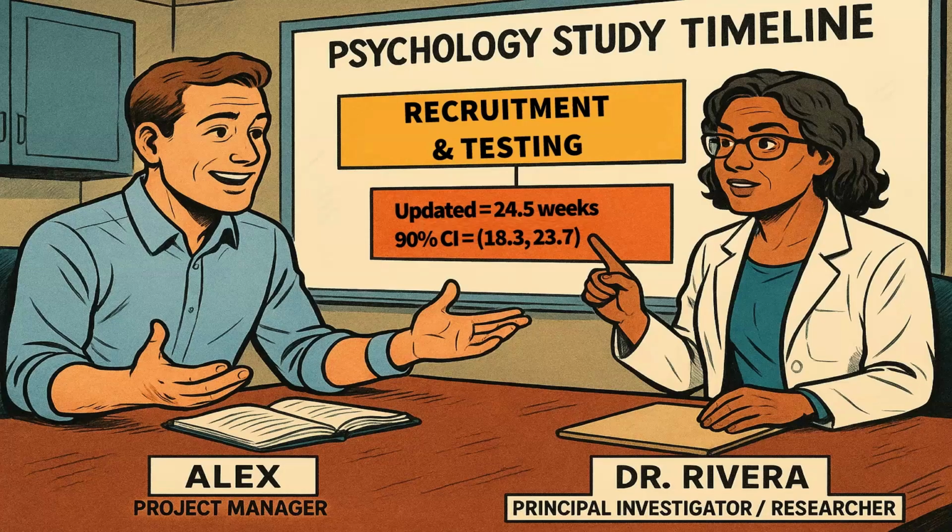So this illustrates that your 90% confidence interval gives you 90% confidence that whatever happens is going to fall within those boundaries, but it does also allow for 10% of the time for you to fall outside of those boundaries. I chose 90% because those are the confidence intervals that project managers do use. They will give you typically a deadline that'll work 9 out of 10 times. And in this case, an unforeseen circumstance, a data breach, pushes them outside of their confidence interval window.